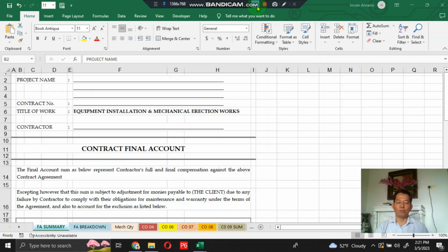The report also offers an opportunity to explain reasons for any planned deviation that may have affected the project's overall schedule and overall cost. This project closeout includes basic project information, deliverable list, project summary, budget review, timeline review, scope change, resources review, project document, and upcoming dates for next projects.